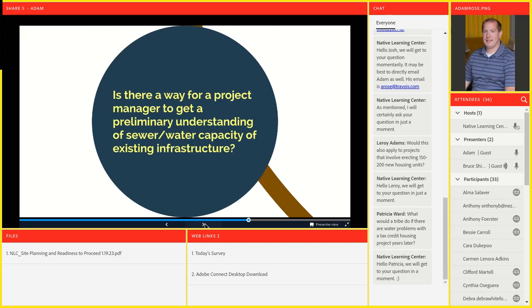So if you develop more than what you're going to need, with the expectation that you or someone is going to need it down the road, that's always a good thing to do. Because the trenching and installation is expensive, but changing pipe size from one size to the next size up isn't as expensive as having to rip it out and reinstall down the road.